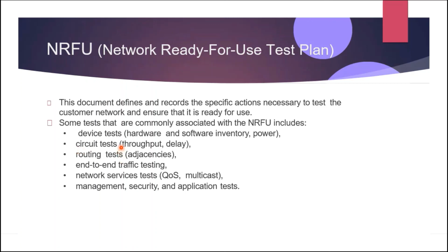So some of the tests that are commonly associated with the NRFU include device tests: hardware, software, inventory, power, syslog error; circuit tests like throughput, delay, jitter, errors, if there are errors.